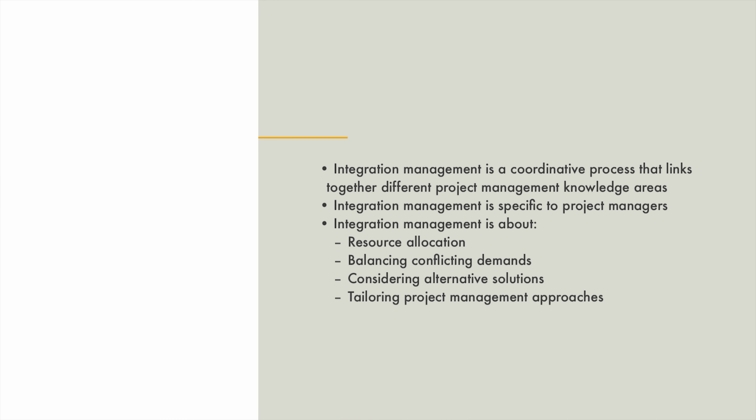The following considerations are typical to integration management. Allocation of resources. For example, how much of the project team's time is allocated to risk management, communication, reporting, and other activities. Balancing conflicting demands. Projects are carried out with limited resources, and this, from the viewpoint of resource utilization, poses considerable challenges. Sometimes you may need to decide whether the next working day of the project's lead designer will be used to schedule a sudden design change required by the customer, or to solve a quality problem in subcontracting.